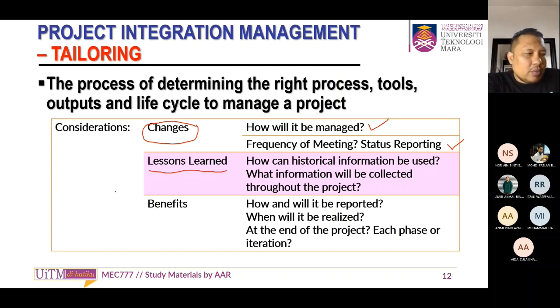Because of this GST, we need to get permission from the government to charge. The GST is not simply charged. The government directed our team to apply to the CCAP, Cawangan Khas Amalan Perubatan. So we need to go through the CCAP to get the approval, and then we can start to develop the hospital.